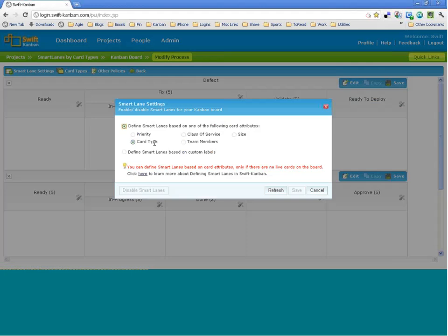So if you say critical, you can always say that if there are 10 criticals, that each critical will compose of user story defects and issues, but no subgrouping. But yeah, definitely, that is something we can build a hierarchy. We can look at building a hierarchy within these smart lane WIP limit settings. Sure, but yeah, that is one way to model: you can define by priority, and if you define your swim lane by priority, for each value of priority you can set a WIP limit, which will be kind of equivalent to the split you're looking for. Did I answer your question? Any other questions?